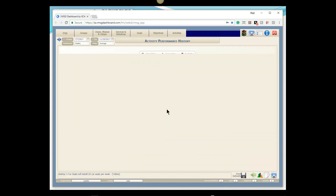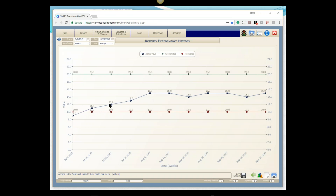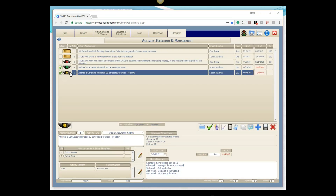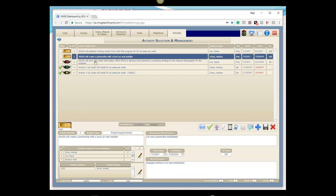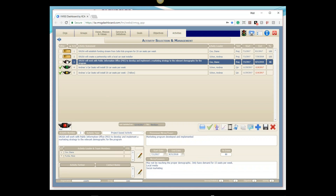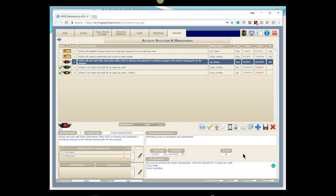Now let's play devil's advocate. What if the chart showed we ramped up but capped out in the yellow zone at about 14 or 15 car seats a week? That's an issue — we're not in the green, traffic light is yellow. I'll march through the plan: funding has a gold bar, installation partner has a gold bar, but work with PIO for marketing has a big red light. That's where I focus. Going down to the notes field, there should be a note saying we may not be reaching the proper demographic, and demand is only 15 cars a week.